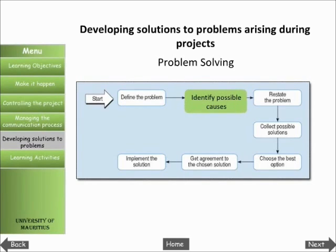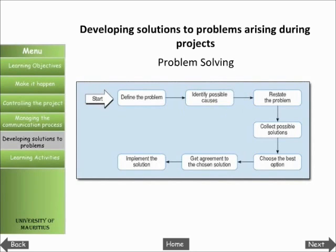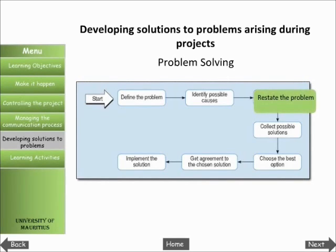Identifying possible causes: the possible causes of a problem can be written in the form of a fishbone diagram. This can be a useful method to help a group examine causes of problems and perhaps also to clarify your own thoughts. A link to a sample fishbone diagram is found on the page. Restating the problem: if your analysis of the problem and its possible causes is complete, it should enable you to rewrite the problem statement to include the causes.